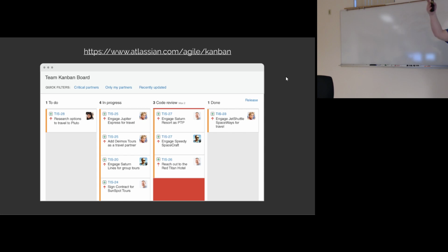A lot of teams start with just the 3 columns, but you eventually usually start moving a lot closer to as many columns as you saw in waterfall, if not more. Does that make sense? It comes more as you get more people involved. If 5 people have to do something on this item for it to be done, then you usually end up with 5 columns. It's usually roughly correlated with the number of people that are involved. But it might be 2 or 3 times that, simply because sometimes those people do 2 or 3 different things along the way.